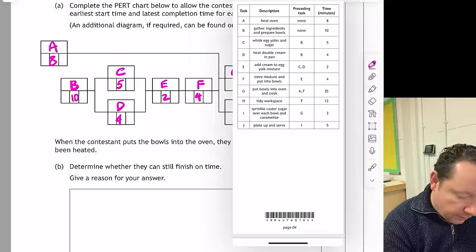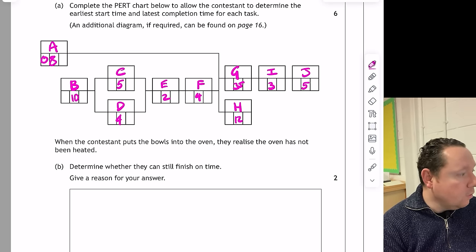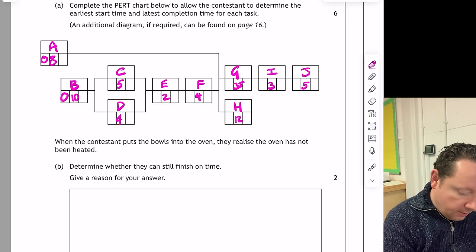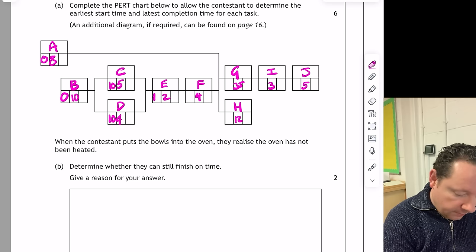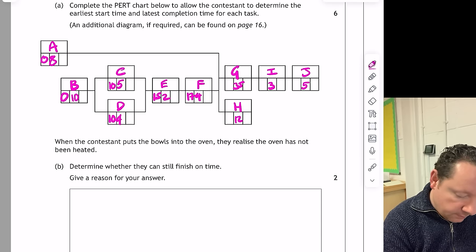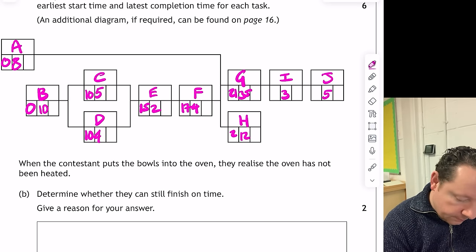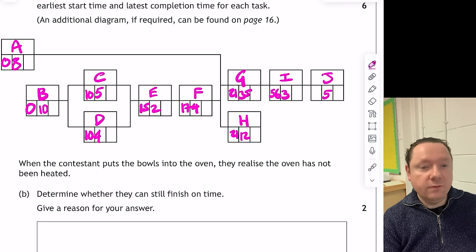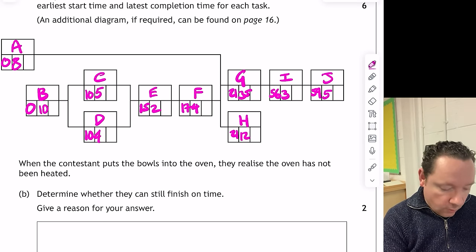We've done our forward scan setup. Starting at zero here, B also starts at time zero. Zero plus 10 is 10, so this starts at 10. The next key one is 15 because we need to wait until C finishes: 10 plus 5 is 15. Then 15 plus 2 is 17. 17 plus 4 is 21. So G starts at 21. 21 plus 35 is 56. 56 plus 3 is 59. And below we've got 21 plus 12 for H. We've done the forward scan.